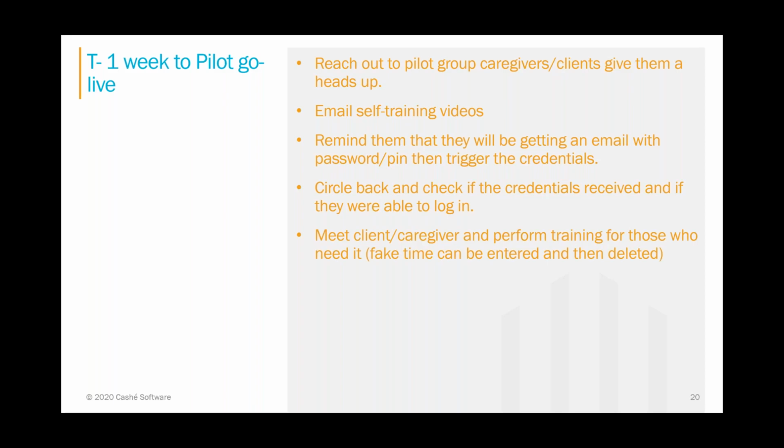We have agencies that have brought people in-house and performed training. And we have methods to do fake time and enter the time, see it go through, and then you can delete the time, so it's not going to affect payroll or billing, but our system allows you to do that. So make use of that to do some training. Log in as the caregiver, test out how you pick the client, enter the time, enter ADLs, sign and submit with the caregiver, see how it works.